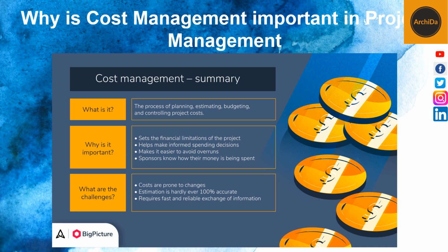Why is cost management important in project management? The main reason why cost management is so important in project management is that your cost management plan includes the guidelines and procedures needed to stay on budget. This is critical because otherwise the organization could lose money as cost exceeds profits. The cost management process begins in the planning phase of the project, where costs are estimated and then a project budget is defined. Then, when the project is executed, the expenses are carefully monitored and recorded to make sure that they're aligned with the budget.